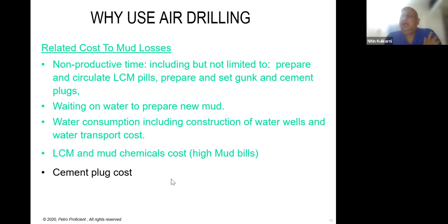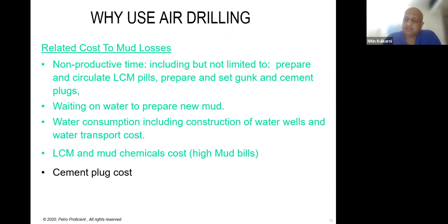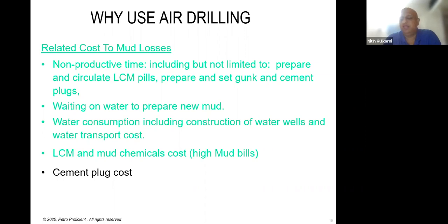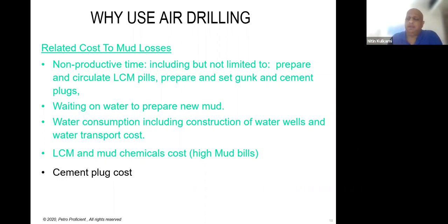When you decide to apply a cement plug, you have to call a cementing company — they need 12 to 14 hours to mobilize resources, then set the cement plug, then you wait on the plug. After setting three or four plugs, if losses are still everywhere, it takes a very long time. Each callout at the last minute makes it expensive. Instead, with air drilling you can drill the section faster and cement, avoiding these repeated plug operations.